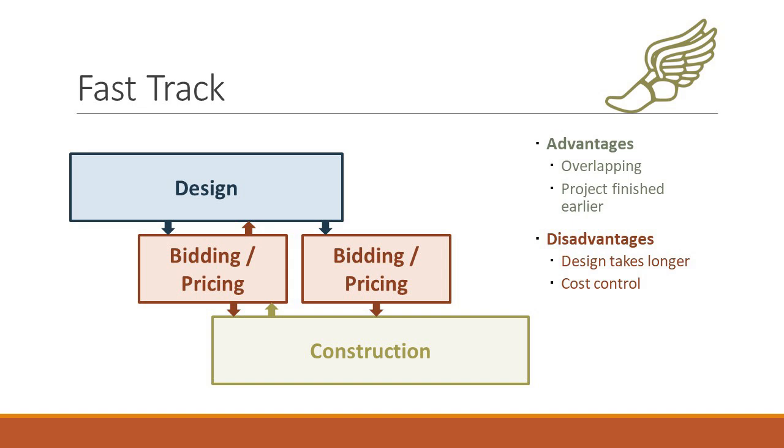The design may take a little longer because you get the initial design done and then you bid it out, and that may be for the whole project or maybe for a portion of the project. And the contractor can start working on excavation and concrete formwork and other stuff while the designer is finishing the designs for the rest of the project, of which then the contractor can come in and do bid and pricing. And so by the time we get to the end of the bid pricing section, the construction's well underway, and then the parties finalize what the whole project is going to cost, and the construction gets finished.